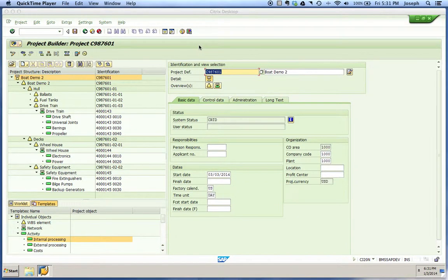For this recording, we're going to show the impact of scheduling on material delivery dates. When a project is scheduled, the delivery dates on a purchase requisition will automatically change and impact the procurement of that object. So one thing that we need to do is we're going to be working off of our critical path and activities in this